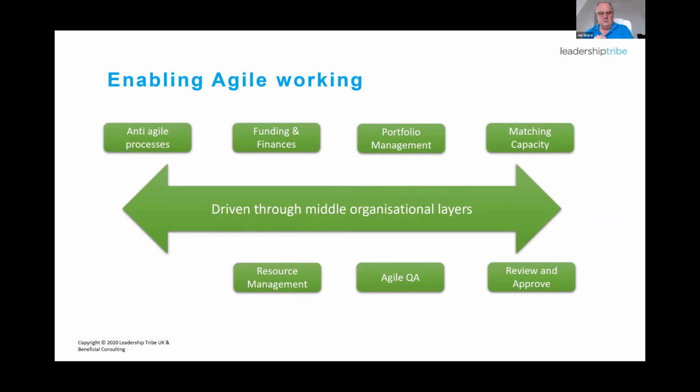Sooner or later, and I hate this term, there's a word called resource management, and I hate talking about resources, as every resource that I know is a person, unless it's a room or a computer. So instead of planning workload by person, you start to plan and think about workload by team. The reason is that we're going through that Tuckman model time after time, and we want the team to learn to work together and create expertise as a unit rather than individual expertise, because that unit can then add more value than the component parts of the membership.